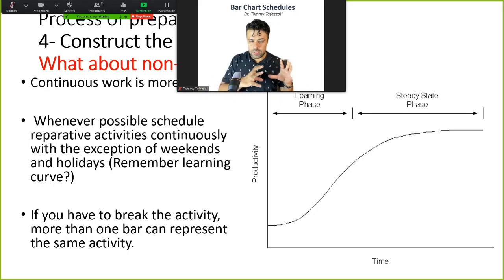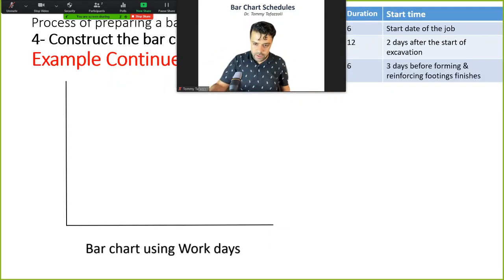So if people continue working, yes, I can understand that they could get tired, because they're human beings, and their productivity might be compromised, might be lessened. But in fact, in longer shifts, since everything is in the steady phase, the productivity is comparatively high. So try to keep everything in the steady phase as much as you can. This is a very golden thing in scheduling.